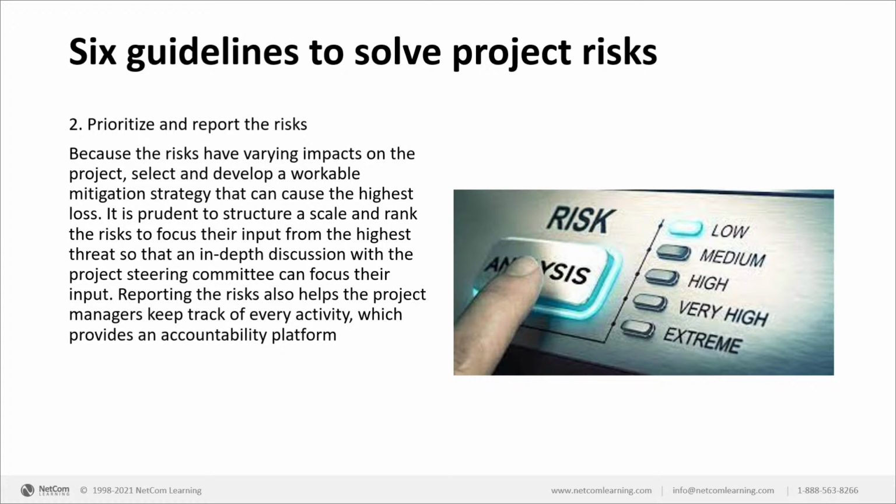Now, the problem is, as a project manager, you have limited resources. You cannot simply try to deal with all the uncertainties that are identified. You cannot do that. You have limited resources. So you need to find out, of all these uncertainties that are being identified, which one's going to have a very high impact, which one's going to have not that high impact on your project. So which one is critical, which one is not that critical.